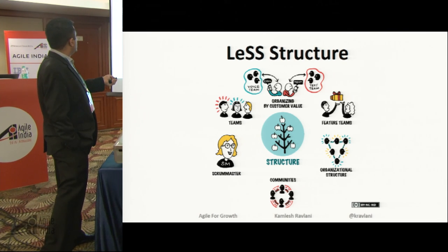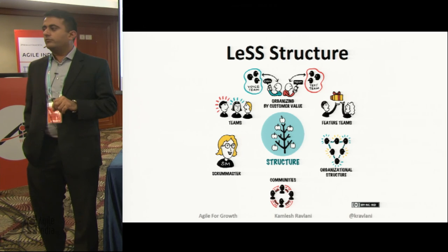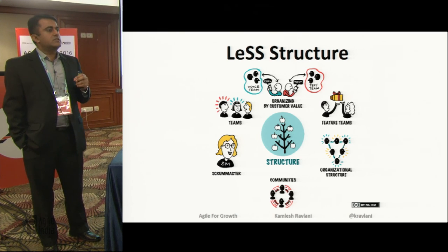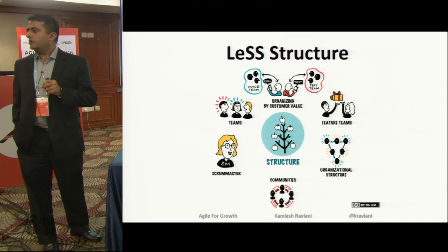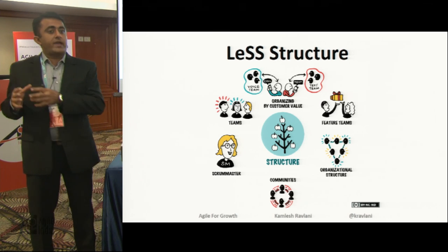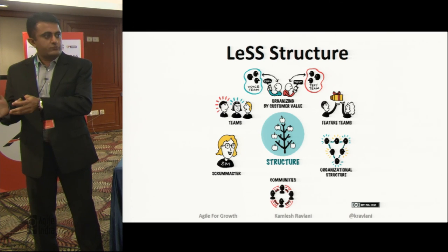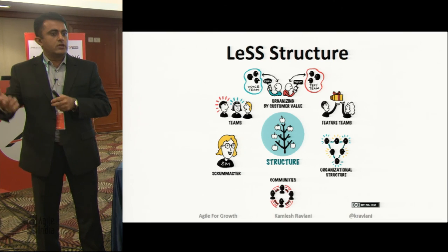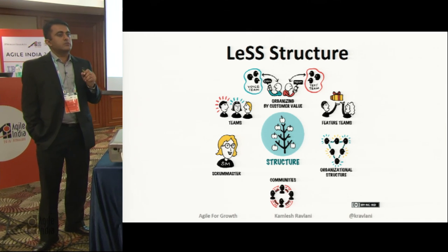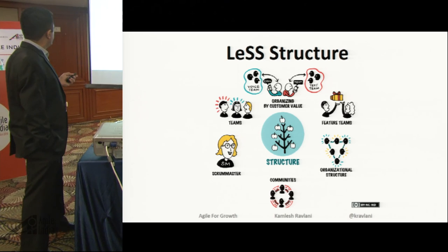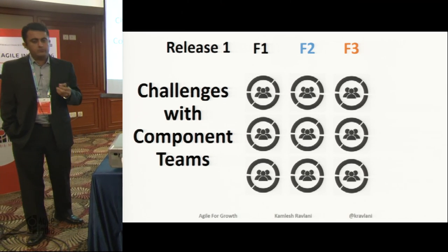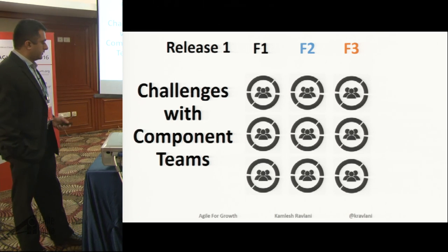LeSS talks about having feature-based teams — teams which have the ability to pick up a product feature, implement it, and deliver it in its entirety without being dependent on any other teams. That also means if there were dependencies on the backend — database changes, API changes, middle layer changes, front-end code — this team is able to do all of that itself. Let me dig deeper into the challenges we face with component-based teams versus feature teams.